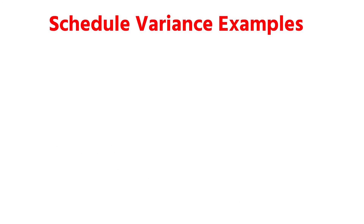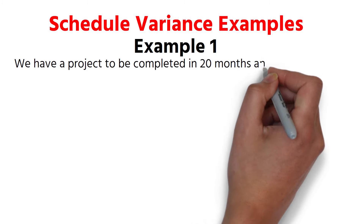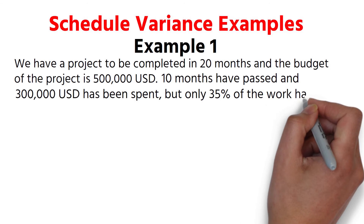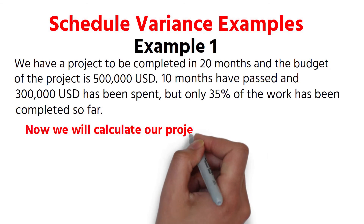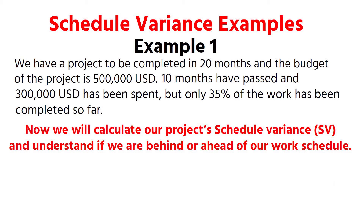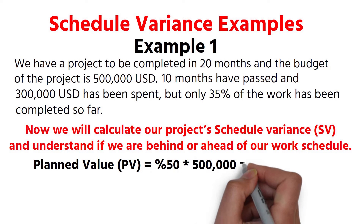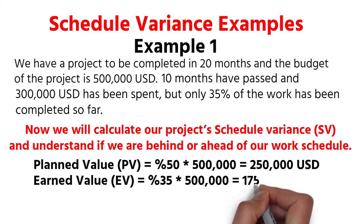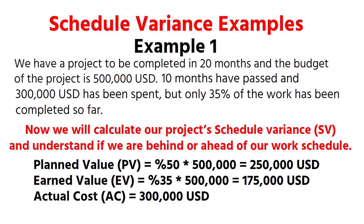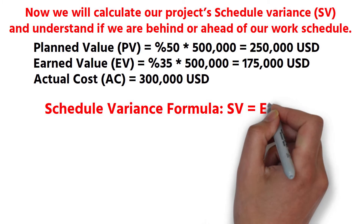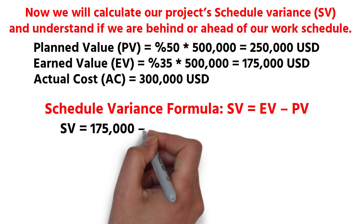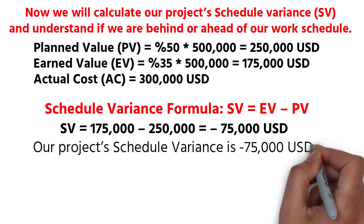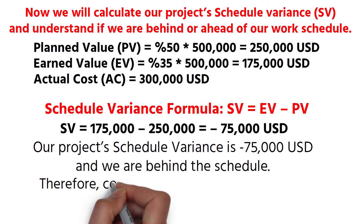Schedule Variance Examples. Example 1. We have a project to be completed in 20 months and the budget of the project is $500,000 US dollars. 10 months have passed and $300,000 US dollars has been spent, but only 35% of the work has been completed so far. Planned Value = 50% × $500,000 = $250,000. Earned Value = 35% × $500,000 = $175,000. Actual cost = $300,000. Schedule Variance: SV = EV − PV = $175,000 − $250,000 = −$75,000 US dollars. Our project schedule variance is negative $75,000 and we are behind the schedule. Therefore, corrective action should be taken to reach the targets.